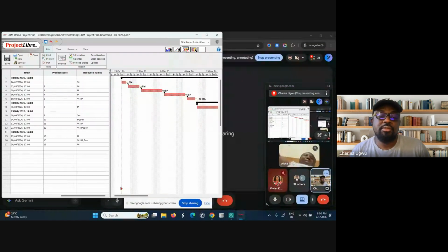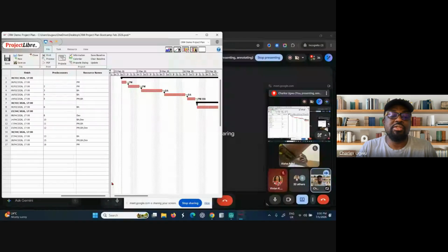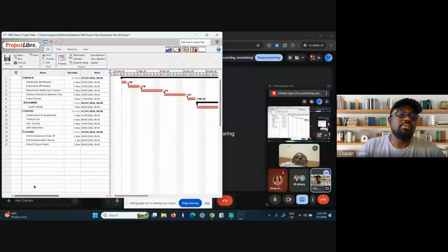So that is it. We don't have time to start restructuring it, to start fixing, because once we do it, we need to start adding all these predecessors. We will have to start afresh and just rebuild the whole project plan afresh. But that's the difference. If we have slack, that is the main purpose of the critical path: understand the longest duration and areas that we don't need to play. Tasks that cannot be delayed. Every task here cannot be delayed. That is the purpose.